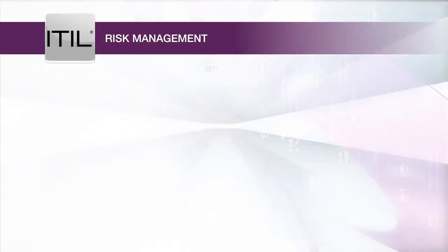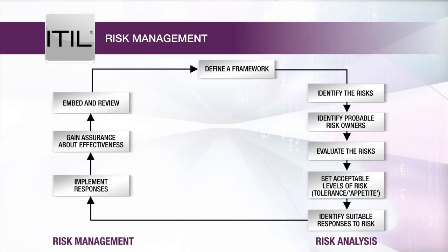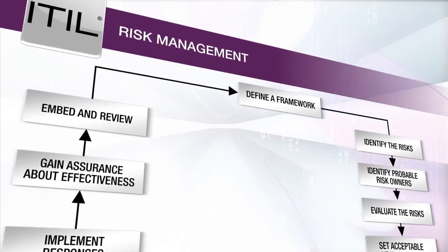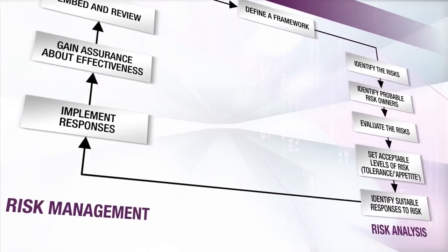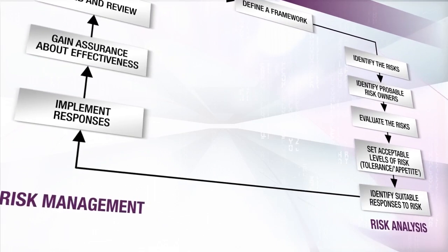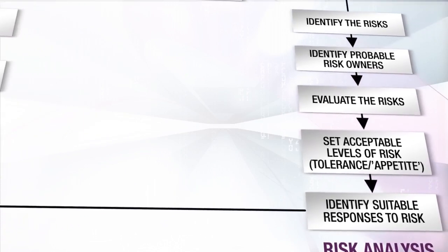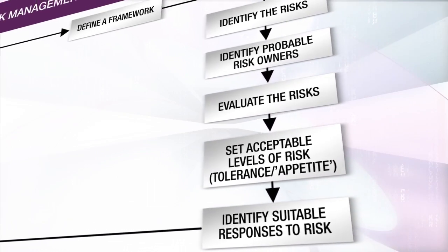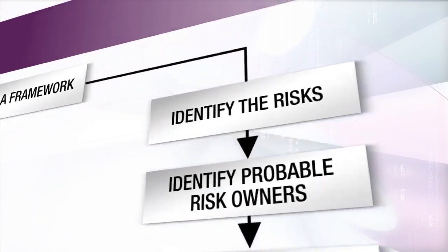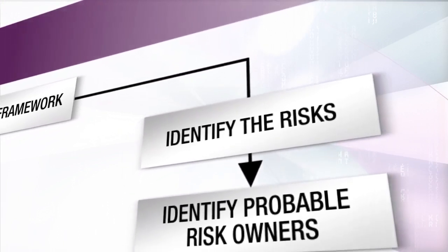It is important to identify risks and then manage those risks through a visible, repeatable, and consistently applied framework. The defined framework should include all aspects of risk analysis and management that should be applied. Aspects for inclusion could be, for example, recommended scales for analysing risk impact and probability and standard risk categories for potential risk escalation. Once the risk has been identified, it needs to be analysed in line with the guidelines of the risk framework.